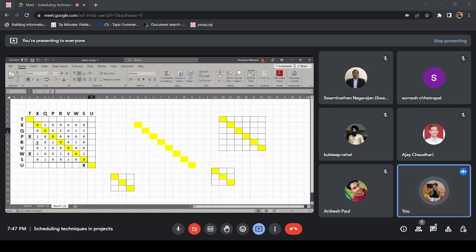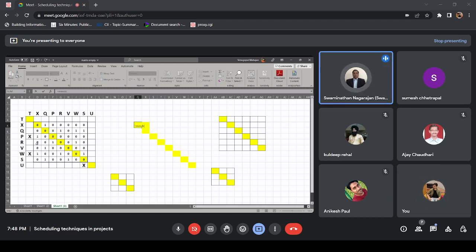Okay, so now we have converted our active block into a binary matrix, right? Everybody agrees? Yes, sir. So now let's do matrix multiplication. That's the formula, right? MMULT. Yeah, and you can give the same range for this.